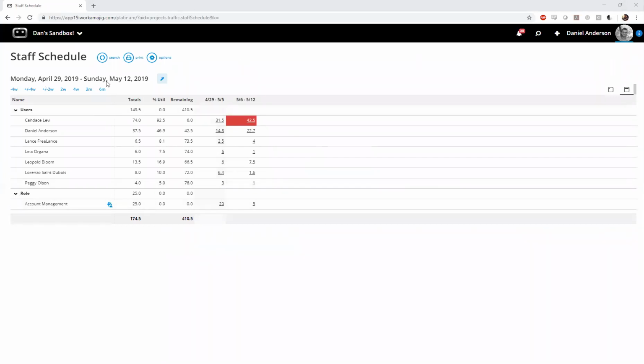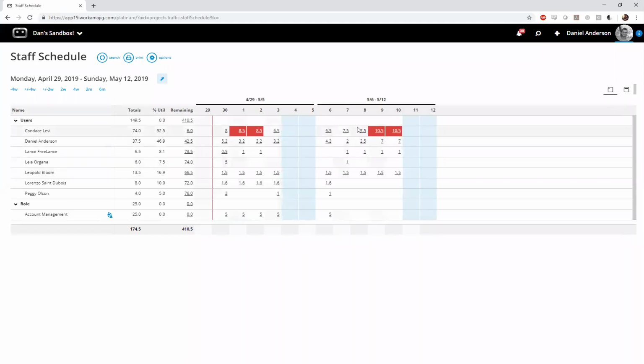And by default, we look at 2 weeks, but you can expand or contract or take a look at a specific snapshot for a time period. But again, it's using that same resourcing calculation I just mentioned. We're cutting up things evenly for the allocated hours over the duration of a task, and we're providing detail either by week or by day what a user is assigned to in that particular period.